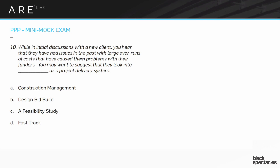Another way you could imagine doing it is through something like design-build, where the architect and the contractor are actually one entity. They can be one entity in all sorts of different ways. It could be a contractor who hires an architect, an architect who hires a contractor, or just people who like doing both. Design-build is a very different project delivery system.